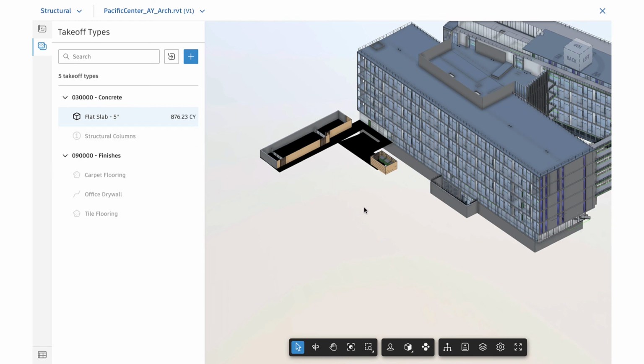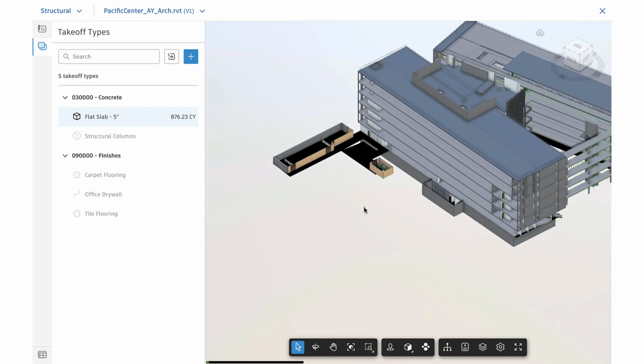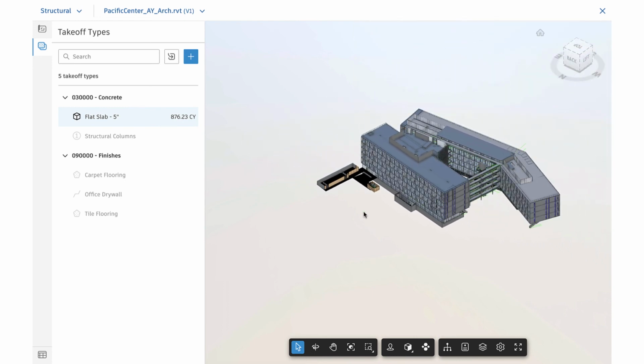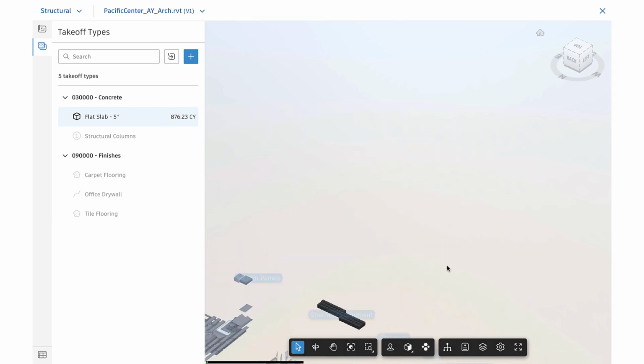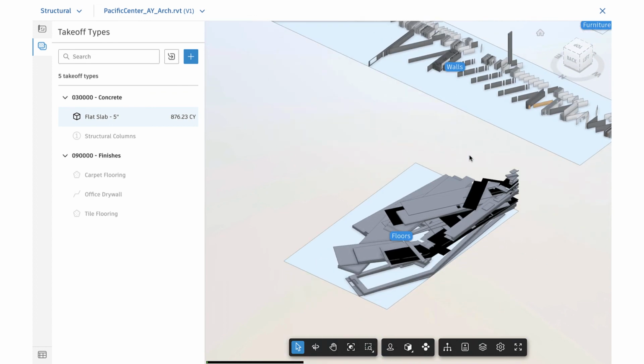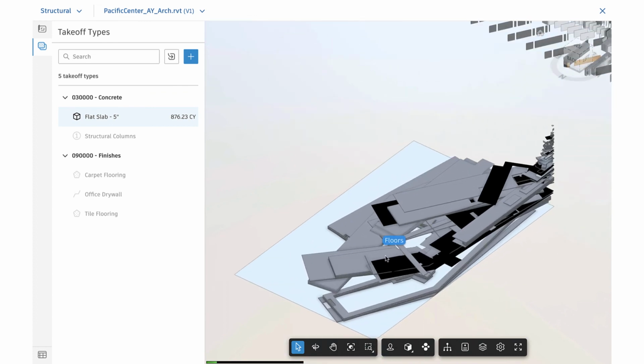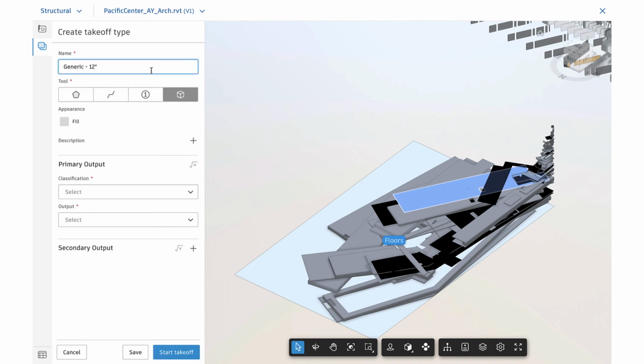If we want to make sure that we've taken off all the items in this 3D building, we have the Form Clusters command, which breaks down the building to all of its distinct categories from Revit. We can see that in this case, we haven't taken off all of the floor items, so I can click and repeat the process. Same applies for any other item in the model.